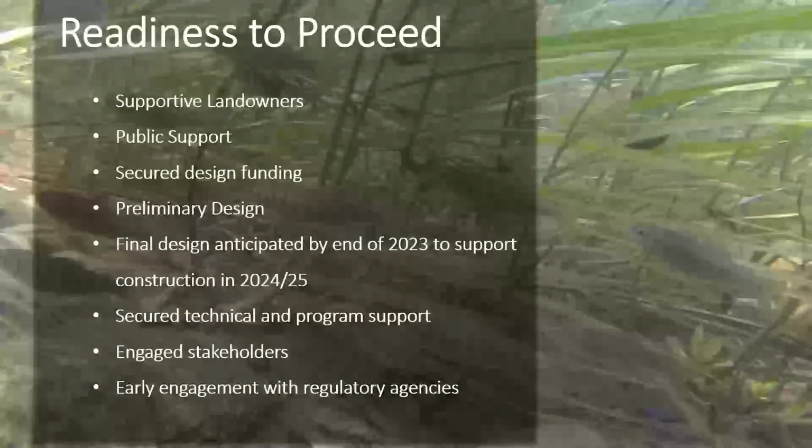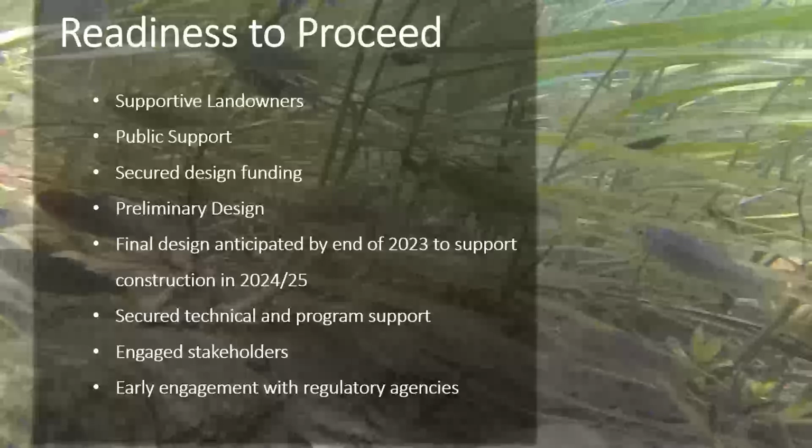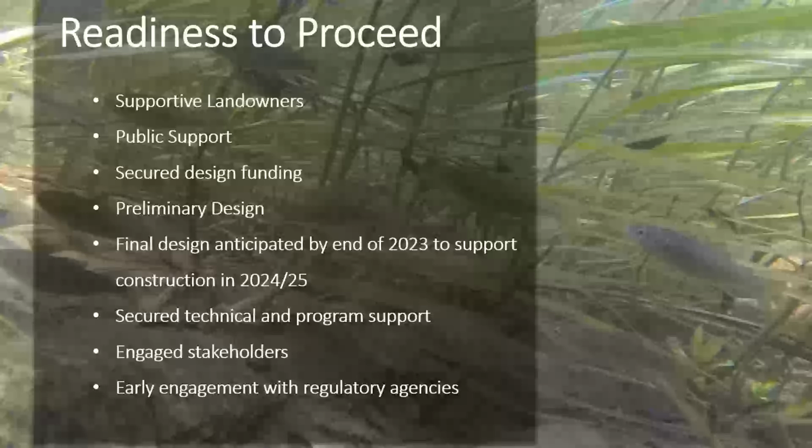So we're ready to get rolling on this project. We have the support that we need from landowners, and we've got a lot of support from public officials as well. This is demonstrated in the submitted landowner forms and letters of support that we included in our application. We've secured funding for design. The preliminary designs will be completed this fall. WDFW, we are at final 30%. Eagle Rocks is a draft 30, and it will be finalized mid-October. Sugar 30% is to be delivered next week.